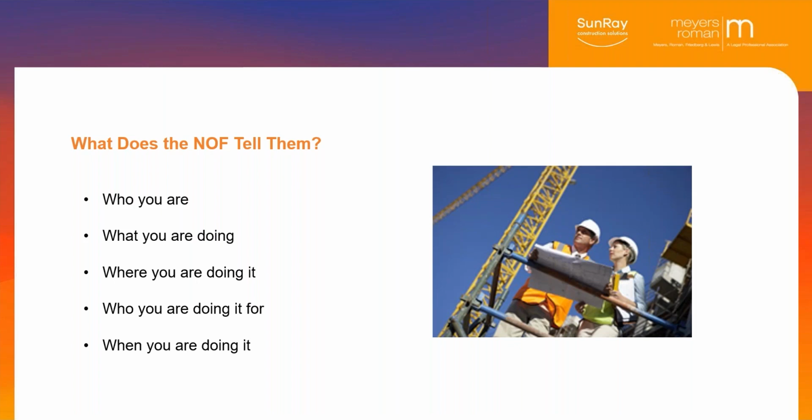But if you're going to do either of those, you just do an amended notice of furnishing. It's not a big deal. You would rather do it that way and not forget about it, because if you forget about it, you've lost all of that good stuff. You lost your lien rights. You lost getting on the list, all that stuff.